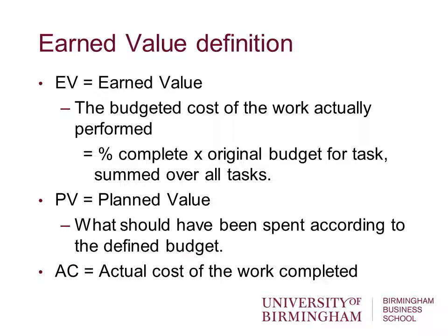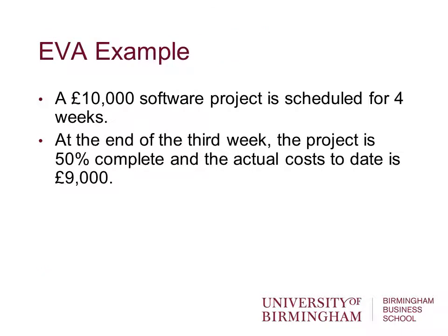So some of the definitions in earned value analysis. Earned value is the budgeted cost of work actually performed. By budget I mean the scheduled or planned amount of work actually performed. So it's percentage complete multiplied by the original budget for the task, summed over all tasks. The planned value is what we should have spent according to the budget, and the actual cost is how much is being spent. The best way to show this is through an example.